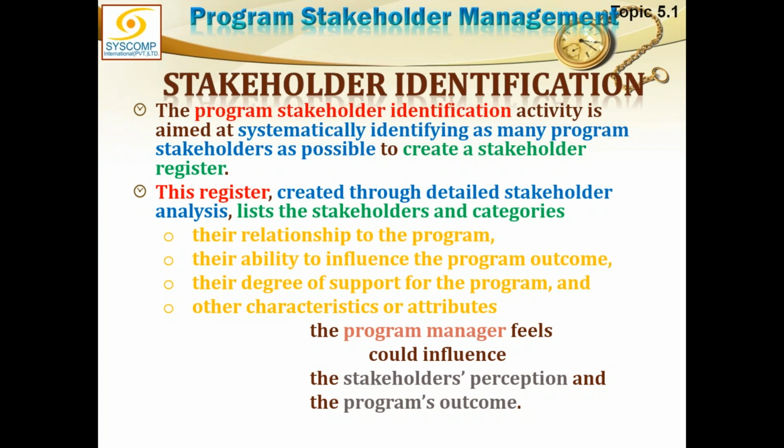There is another document which you can create as a result of analysis. Although we are not as yet discussing analysis, we are just talking about identification. But for your information's sake, in identification we create the stakeholder register, and in analysis, whether qualitative or quantitative, we can update the stakeholder register accordingly. Whatever information about qualitative and quantitative is received is then recorded into the register.